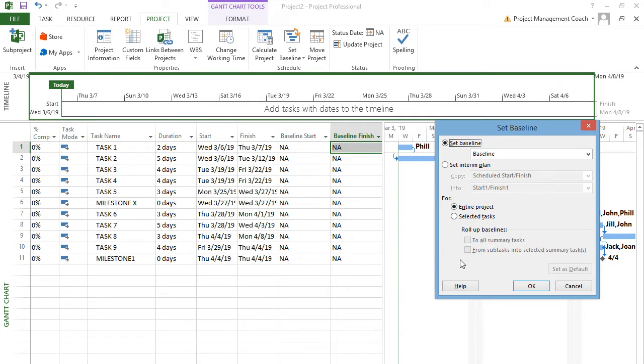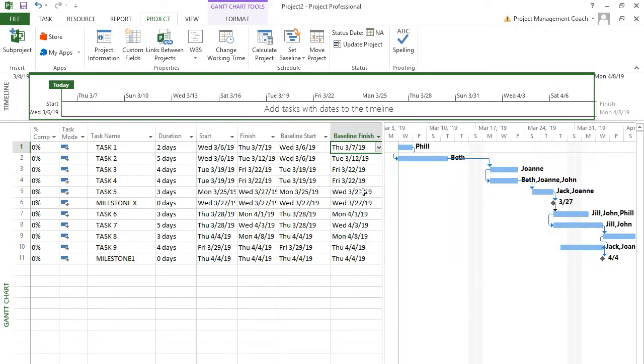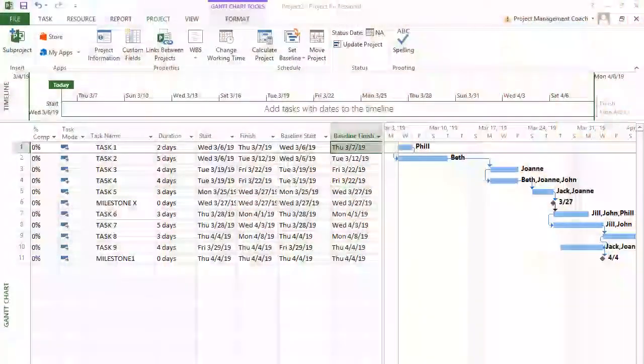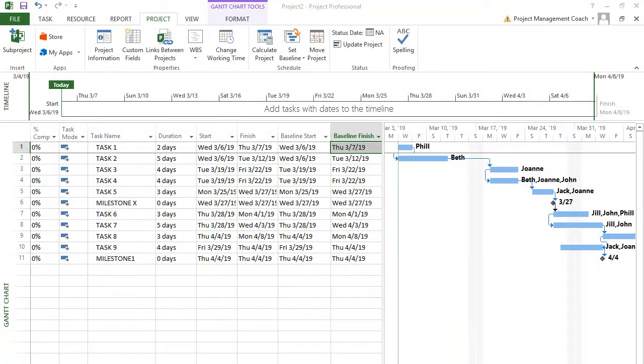In the world of the PMI, the word is change. So we're gonna baseline this thing right now. Let's hit OK. Boom. You can see all the dates just moved in there. Now it is etched in stone. So anything you do in MS Project can and will be used against you, against the baseline, in the context of the baseline. So that's why folks who know how the baseline works, once it's baselined, you better be careful. Better be careful, because it could turn ugly if management sees stuff that they didn't baseline in the schedule.